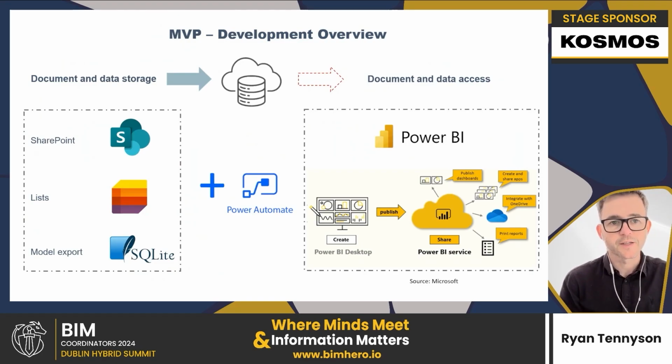And then the use of an SQLite database to be able to export out some of the graphical information from the project models, both in 3D and 2D, and then use Power Automate to connect that to a Power BI dashboard and to make that all available and presentable, in a way that, through simple management of a desktop license, could then be published more widely to both internal and external stakeholders that manage the building portfolio on behalf of that local authority or client.